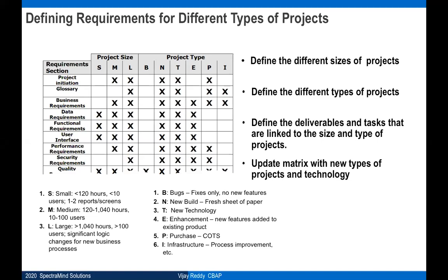But that can also be included in these requirements, right? Yes, right. Because it depends on how complex a project you're handling. If you're a lead BA managing a team of BAs under you, then you should give the estimates for your team. How many requirements you will gather, how many days it will take to complete these requirements, or how many interviews and workshops you will be doing.